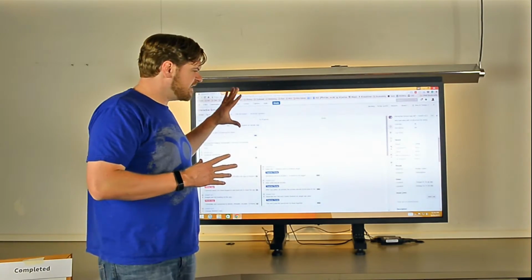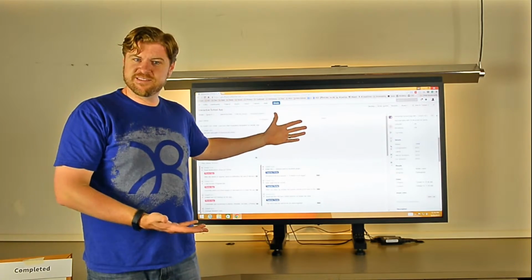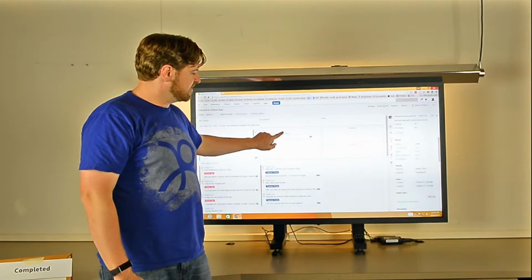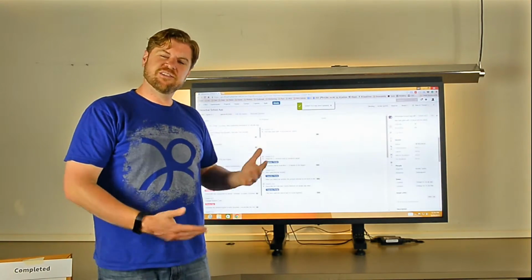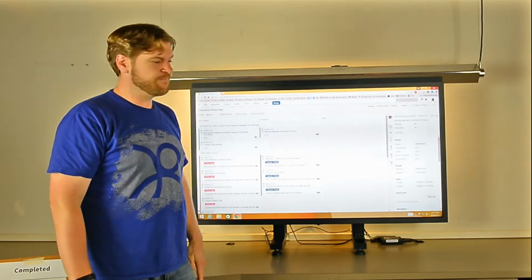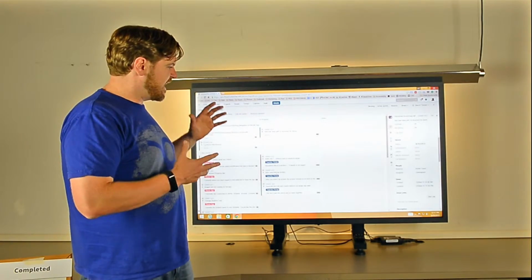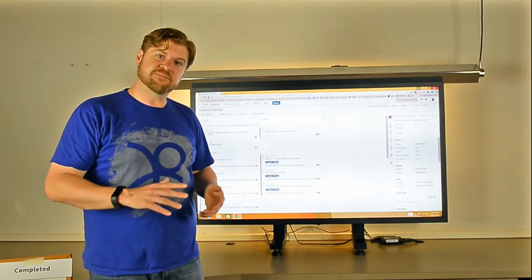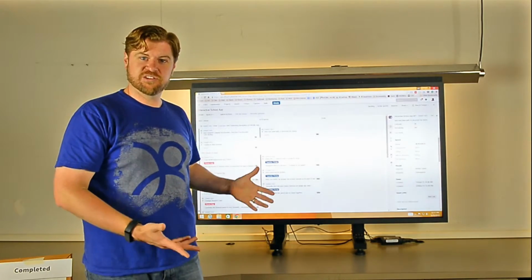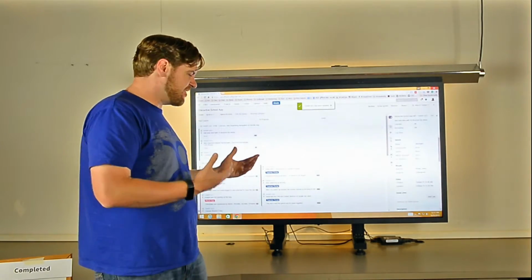And so the way we've implemented digital boards at AGI is to actually use a system like Jira, our web-based system, TFS, Trello, any of them that actually are touch-enabled, and go through and actually have that physical touch. We do that by having a touch overlay on top of a TV, which is nothing more than a monitor, and a computer mounted on the back. This whole setup's about $2,500, and so it's not that cost prohibitive. So we actually address the issue of physical space and having real estate issues because any team can come up and use this. It's also a nice presentation tool, looks great. But you can go through and actually get that value out of the board.